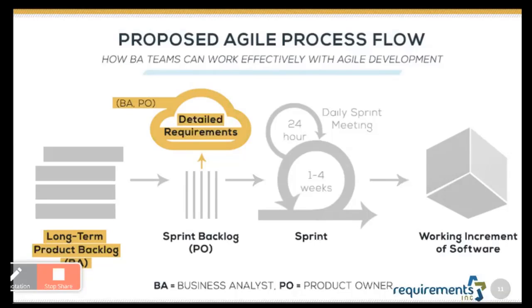Consider what you can do in a week or 2 weeks or 3 weeks or 4 weeks, but it has to be that short. Within a week, and 2 weeks are not very common. I mean, I'm sorry, 1 week is not very common. To pull off a 1 week sprint, your team has to be extremely capable and on top of things. So they have to be very used to the Agile structure. And sometimes the project itself may not blend well with a 1 week sprint, because there's only so much you can do. And then you might have a certain feature that drags on to 2 weeks or 3 weeks.